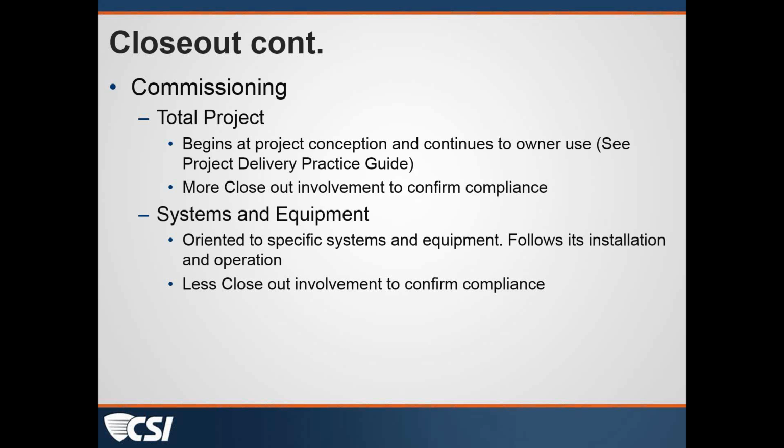It should be basically a recording of what we have been through since the beginning of construction, and would include the specifications as well. Agreed. And in addition to the RFIs and change orders, any minor adjustments that the contractor's made that he maybe didn't issue an RFI or didn't need a change order for, those should be marked on there as well.